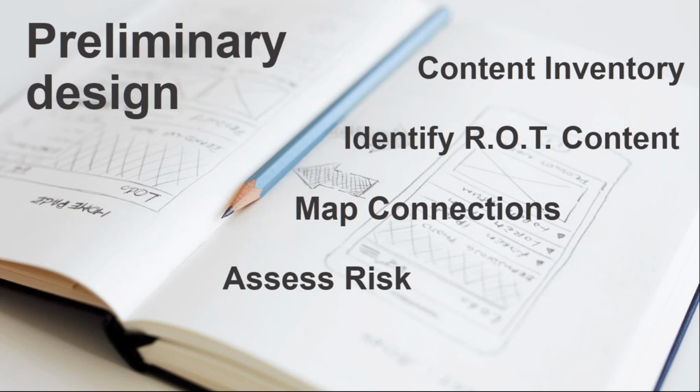When we assess the risk, an example is, do we have enough people to take part in the solution? When we start engaging on it, is there going to be some end of year billing cycle that all of a sudden everybody's going to be unavailable for? Are we licensed for certain things?